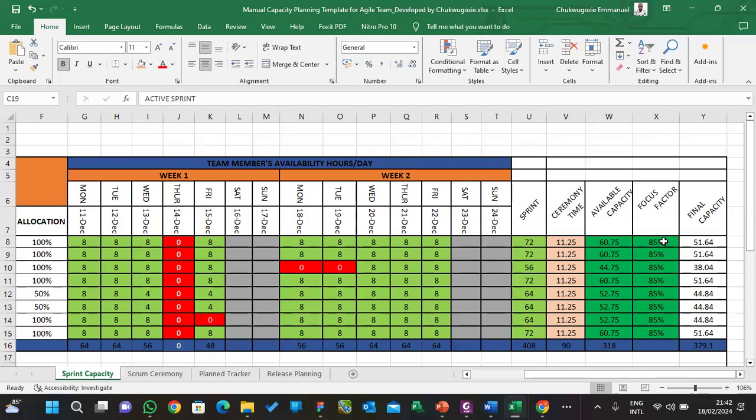It's the same thing. Focus factor means the maximum time that the team or the individual working on that product is focused on just building that product, not pressing their phone. So not during lunch break, not when checking or responding to email, or maybe on an errand and all that other stuff.